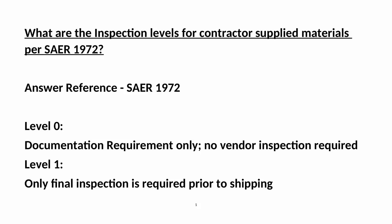What are the inspection levels for contractor-supplied materials per SIR 1972? Answer Reference: SIR 1972. Level 0: Documentation Requirement Only — No Vendor Inspection Required. Level 1: Only Final Inspection is Required Prior to Shipping.